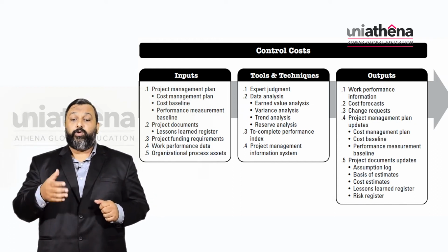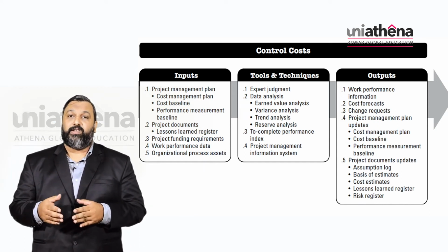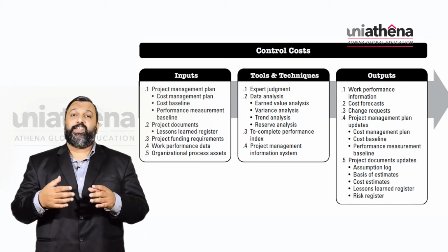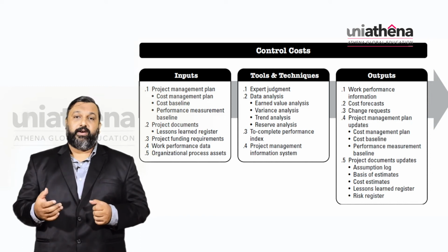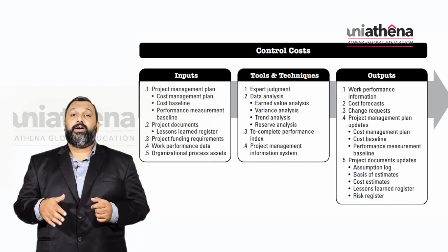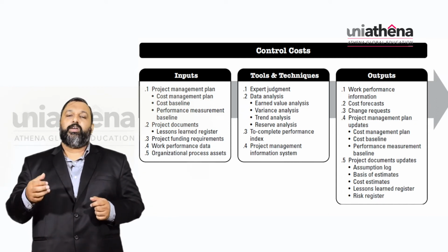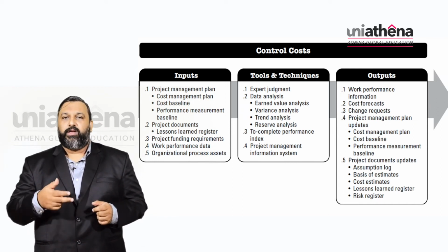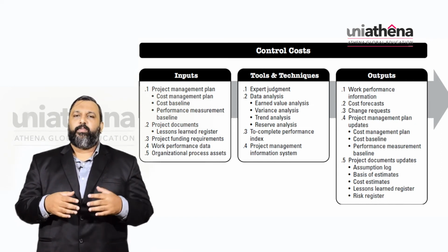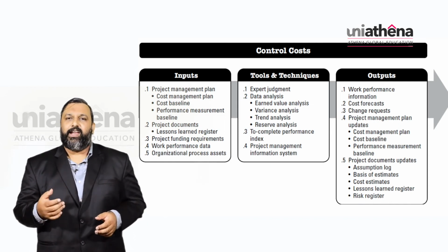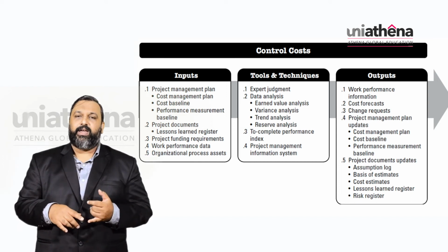Now, what will be your tools and techniques? It can be expert judgment, a discussion with experts or peers in the same field who have years of experience and expertise. Data analysis. Data analysis can be earned value analysis, that is a comparison between your earned value, your planned value, and your actual cost. So earned value analysis can be a technique.